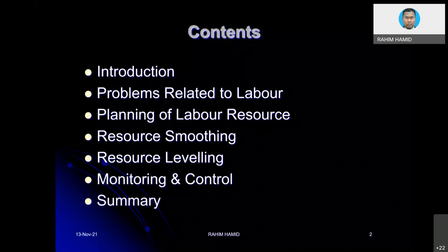Normally, we do not apply it to material, even though when we talk about resources, the three main resources that we use in construction are normally man, machine, and material. Because for material, there are a lot of types, so it is quite difficult to do material scheduling unless you do it in bulk. In certain projects, for instance, revetment, groin, or breakwater, then you can do that because the materials are almost the same, except the size and the rock might be different. So I chose labor in order to demonstrate the usage of smoothing and then leveling.